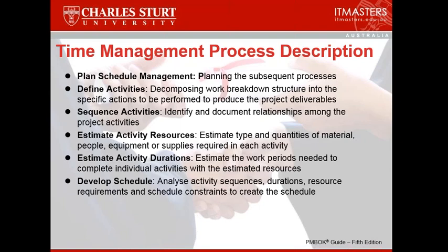The schedule is the end result from all this work, and the schedule essentially gives you a list of all the activities in sequence with their durations, the resource requirements, and any schedule constraints. To create the schedule, there are a whole lot of things that come into play, things like managing your risks, determining what contingencies or reserves you need to build into your schedule to take account of any potential risks. The other thing we'll be talking about is estimate activity duration.